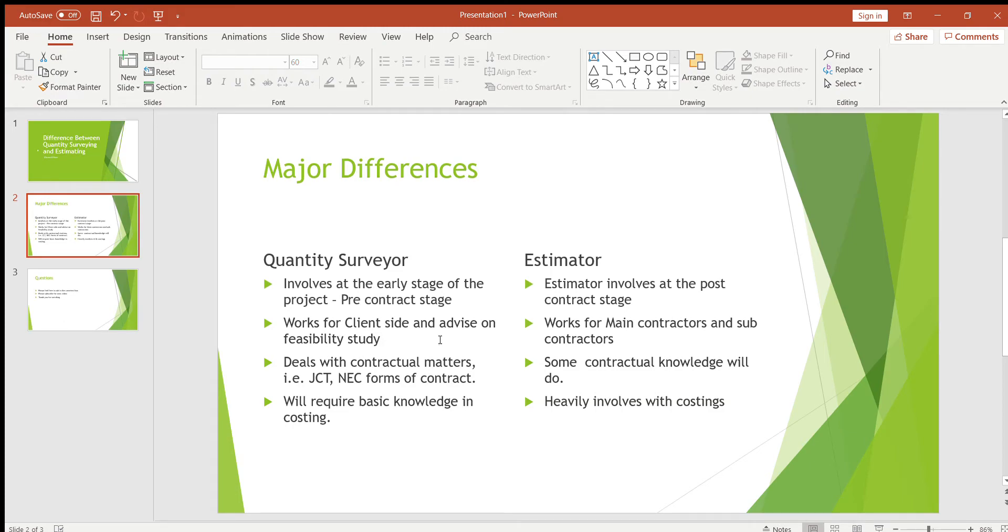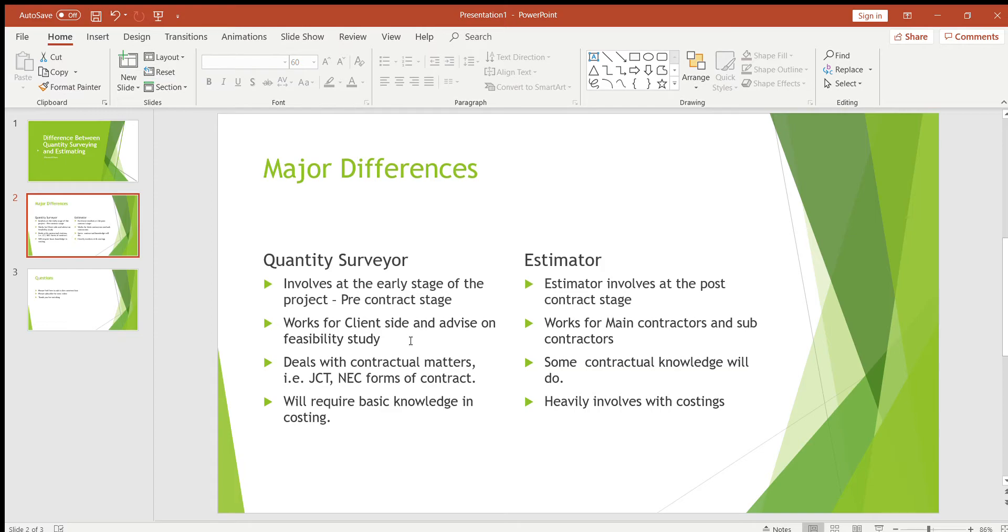If I give you an example on feasibility study, that would be maybe the client goes to an existing job and now he wants to work out how much it's going to cost to repair the existing job or replacement of the job, and how much is it going to cost to build a new project. A quantity surveyor will work out both costs and then present it to the client, and then the client will decide whether he's going to build a new project or stick to the existing job.